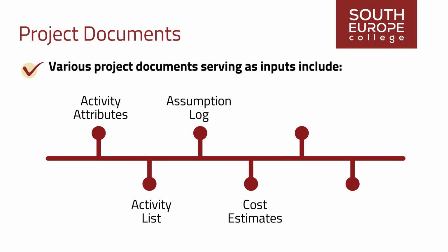Cost estimates. The cost of resources may influence resource selection from quantity and skill level perspectives. Resource calendars, identifying working days, shifts, business hours, weekends, and public holidays for specific resource availability, including team, equipment, and material. Risk Register, describing individual risks impacting resource selection and availability.